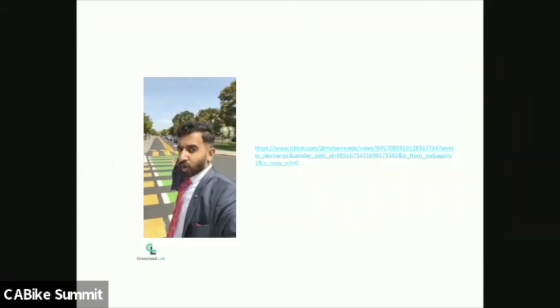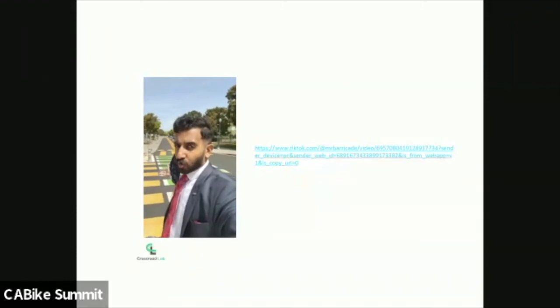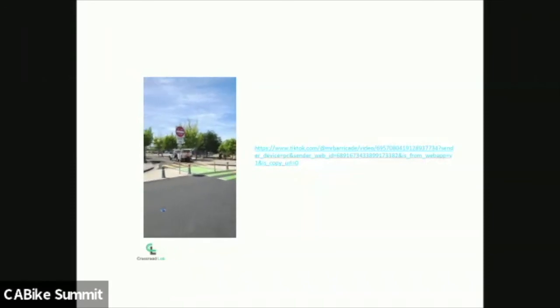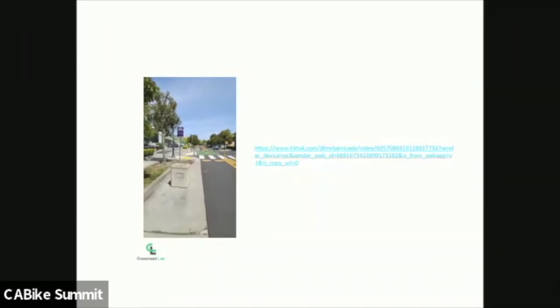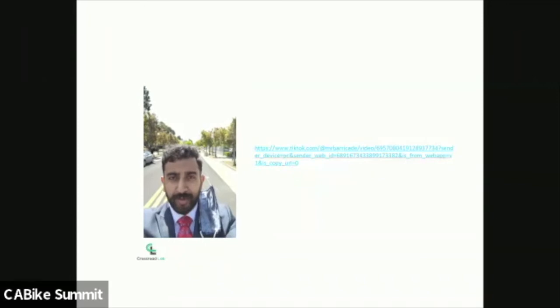Here I'll show this real quick. This is an on-street trail we did, because there was a trail on one side that dumped people onto a residential street and picked them up a few blocks away in Emeryville on Doyle Street. We converted the street into a one-way and took away a few blocks from car traffic. This road was a major cut-through between two arterial streets, and the neighborhood didn't like the cut-through, but they were scared about the parking loss. We convinced them by doing a pilot study for a long time and observing it for a few months. Then we implemented this on-street trail. It's a major connection, it was built very quickly, and now it's a glorified spine of the town.